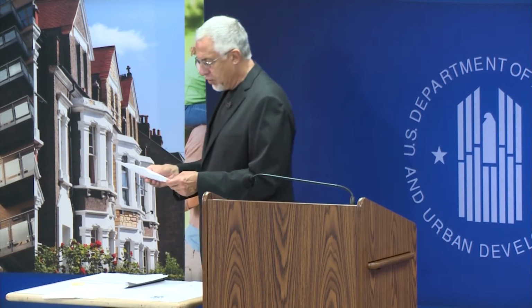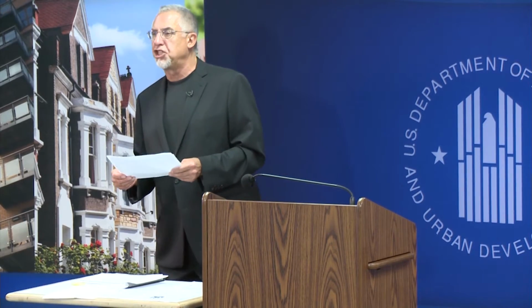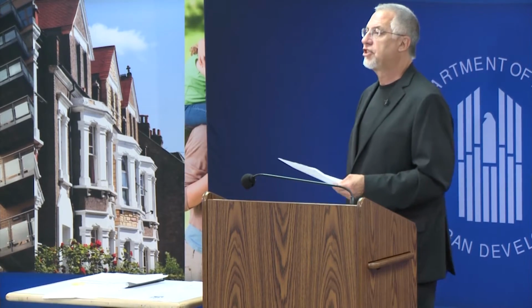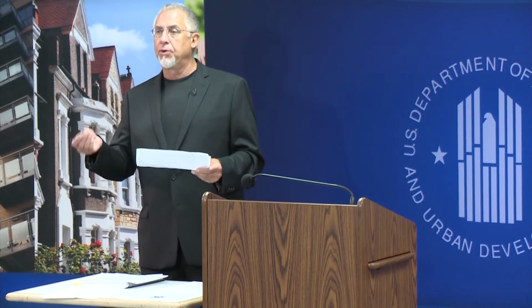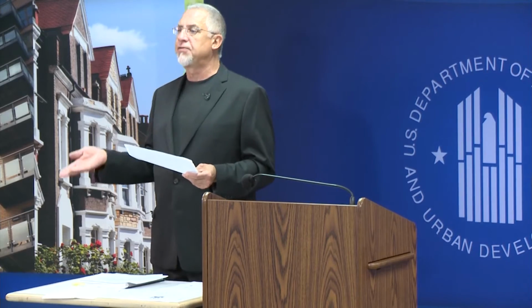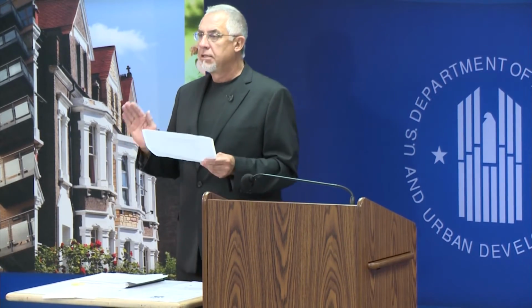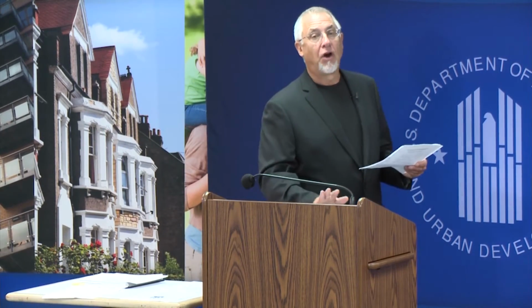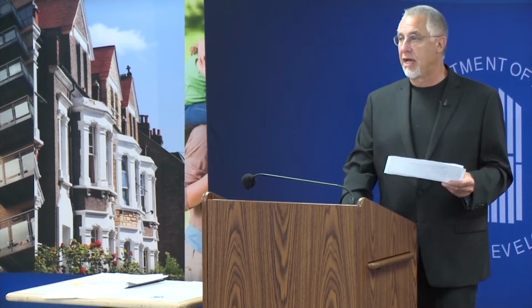A laptop computer for a development coordinator costing $5,000 using IHBG funds. That would be a micro purchase. That would be a micro purchase, yes. Now for IHBG, we have the program-specific requirement that the limit for micro purchase is $5,000. So since they're using IHBG funds, this would be within that threshold of $5,000. However, for the other programs, let's remember that the threshold is $3,500.